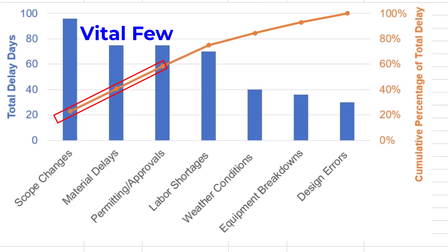Based on our example, the project manager should immediately prioritize these vital few. To mitigate project delays from scope changes, implement a robust change management process with clear approval protocols and impact assessments. Maintain continuous stakeholder communication to align expectations and identify potential scope shifts early. Use agile planning techniques to adapt schedules efficiently, while ensuring resource flexibility and risk contingencies are in place. To mitigate project time overruns from material delays, establish strong supplier relationships and diversify sources to reduce dependency on single vendors. Implement just-in-time delivery with buffer stocks for critical materials and use real-time tracking systems for improved supply chain visibility.